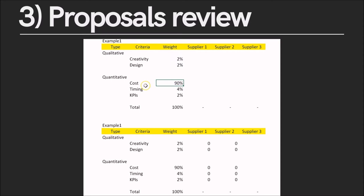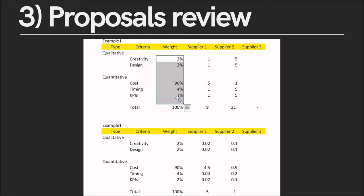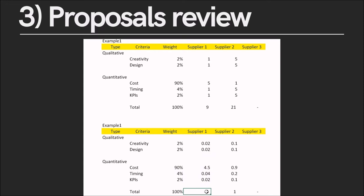Let's take an example. Here I assign a very low percentage to other criteria and prioritize cost with 90%. Supplier number one has very low scores in all criteria except cost, which I assign a five. Supplier two does the opposite — all high scores but a low score in cost. As you can see, it looks like supplier two has a higher score because it totals 21. However, we haven't applied the weight of each criteria yet. That's why you need to multiply. Once you multiply, you will see that supplier number one has a higher weighted score because cost, which is the most important criteria, is where supplier number one scores highest.